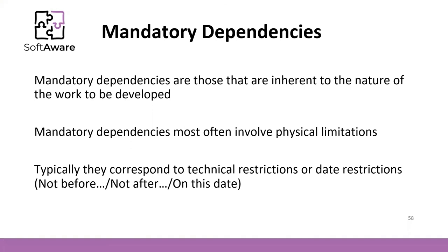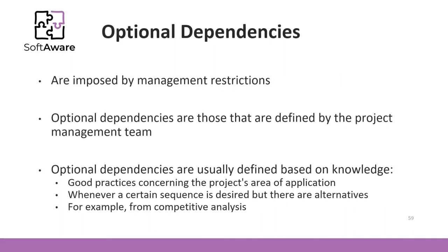You can consider two types of dependencies: mandatory and optional. Mandatory dependencies are those inherent to the nature of the work — it is physically impossible to break this kind of dependency. Optional dependencies, on the other hand, are decisions and options imposed by management restrictions. When you have optional dependencies, you can use those options and change them if you need to speed up the project. We will see that later.